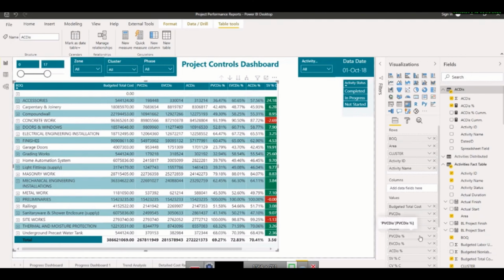But for that you need to think about how you will do it, because I do consultation for that as well, on how to connect ERP. That's called mapping between your cost breakdown structure, cost accounts and chart of accounts. So you need to make the same activity code inside P6.